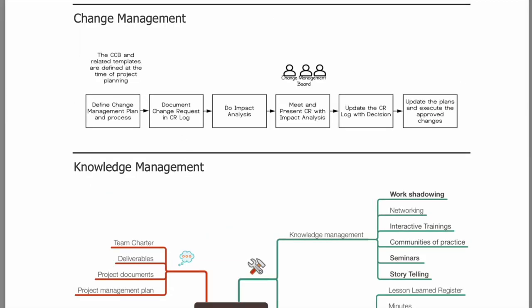We discussed how do we manage changes, what is a change. We have a change management plan. We have the CCB defined at the time of change management plan itself. And I would have meetings with these bigger guys, who are there in the CCB, people who can approve the changes, people who can understand what's good for their portfolio. So these are busy guys. I would have a meeting, pre-planned meeting with them.